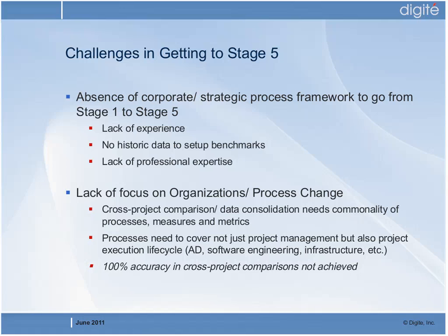But second, fundamentally there is a lack of focus on what changes you need in terms of process. While you might implement the tool, unless you have changed the process and made sure that the tool follows the process, there is again a disconnect between the two and failure of the implementation of the tool. For example, just basic processes or standardization that you need from a cross-project comparison and data consolidation perspective, so that you have a common set of processes, a common set of measures, and a common set of metrics. That is not effectively done before you start to implement the PPM tool.